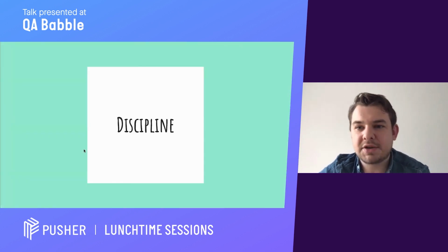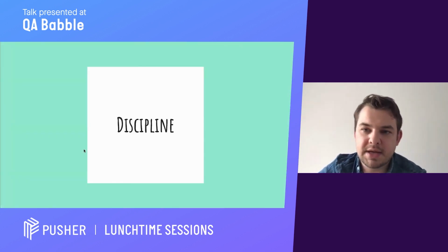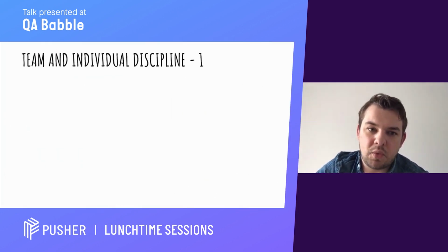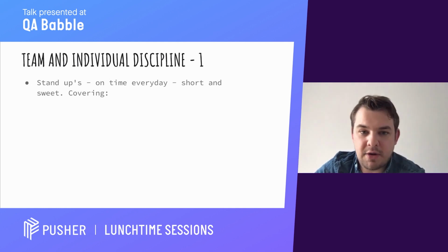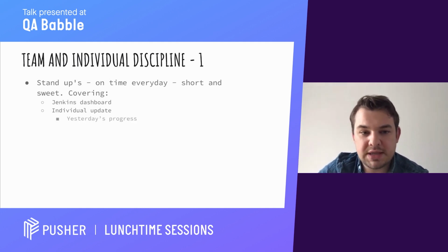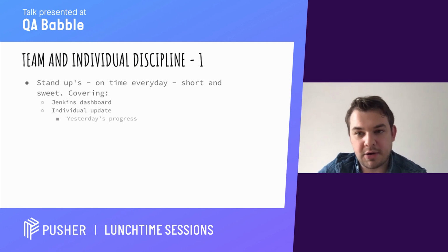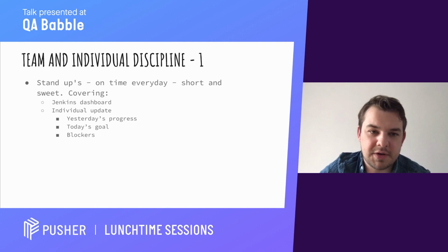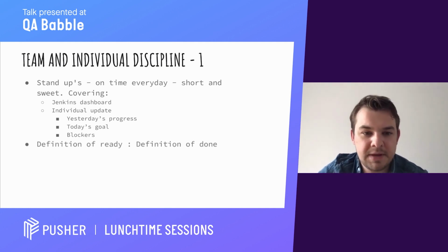So probably the last section I want to talk about briefly is discipline, because I think it's really important on a project like this. We adhered to stand-ups on time every day. They were always short and sweet, at exactly the same time. The first thing we did was cover the Jenkins dashboard, and then we'd individually give an update on what we did yesterday, what we're doing today, and if there were any blockers at all. Each person took less than 30 seconds. I've been on projects where each person takes 5 minutes, and you're bored and falling asleep.